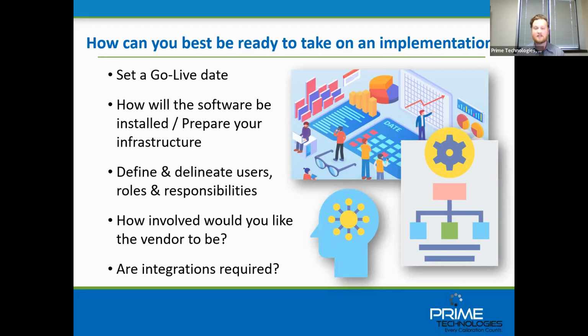Next up is how is the software going to be installed? What's your infrastructure going to look like, and how can you get that prepared? So this is really, are you moving forward with a cloud-based or a web-based solution, similar to ProCal Direct or our new application PCX? Are you looking for more of a locally installed application on your server, whether it be physical or virtual, and you need something more like the ProCal V5 on-premise solution? Not only do you want to know this well in advance, these are some of the things where you don't want to decide you're going with an on-prem solution, we send you the software, you're ready to start the implementation, and you realize, oh, I don't have a server to put this on.